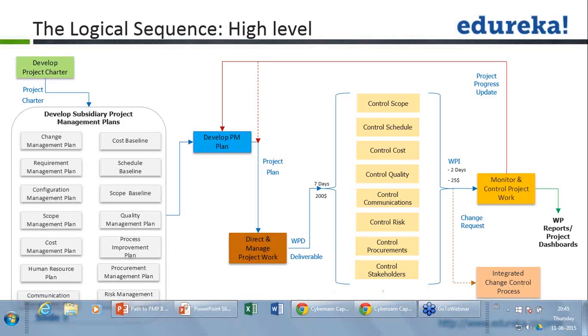For example, everything is right now planned and as per track, but when it goes to your risk, one of the outputs we get is that some of the key resources have resigned and they will be here in the team for 2 months. After 2 months, who is going to do the work, we don't know, because those people are moving out. Right now the project is in control, but in future we may have some problem.